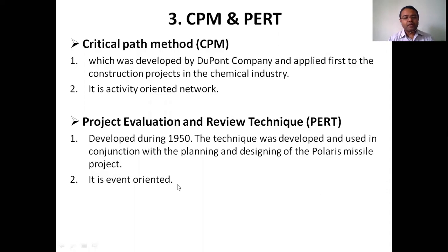To construct any structure up to the plinth level, we have to go through this many activities. This much activity has to be performed. So we'll call these different tasks an activity. Excavation, concreting, we'll call this an activity. And what is meant by the event? Event means we consider that we have constructed a structure up to the plinth level. That is considered as an event.